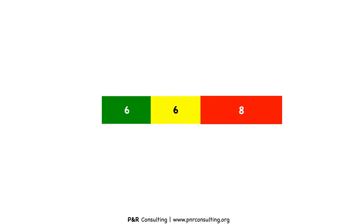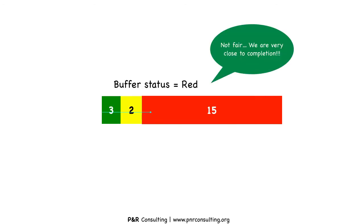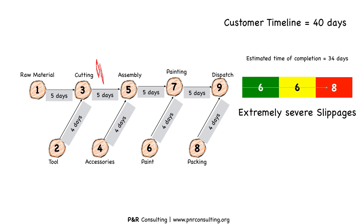Hope you have a better understanding of how to use buffer indicators to monitor and control the project. However, it doesn't end here — determining the size of the buffer itself is crucial in effective monitoring. For instance, a larger green zone leads to a situation wherein the project will seem to be under control even if key milestones are not achieved. At the same time, a very conservative approach would lead to a situation wherein the project appears well under control, but the status report shows a situation contrary to the truth, leading to extreme pressure on the project team.